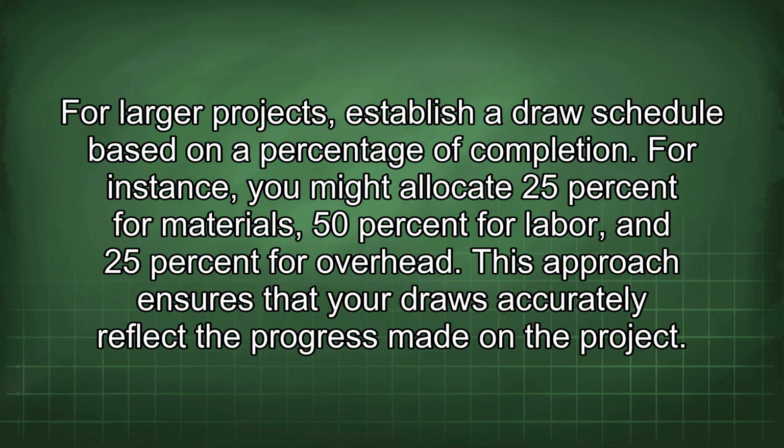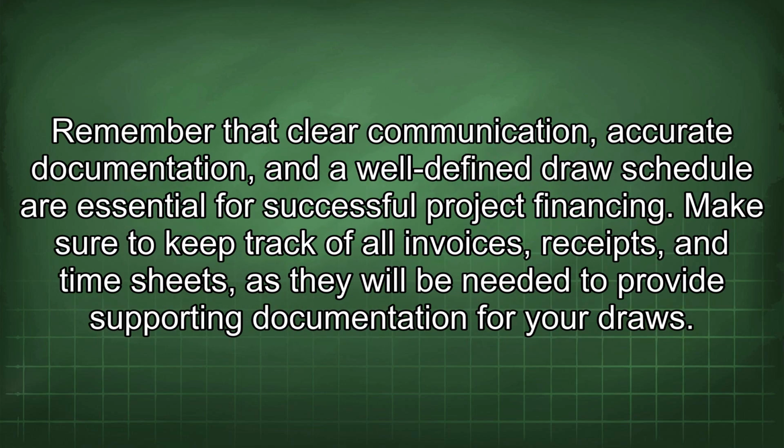For larger projects, establish a draw schedule based on a percentage of completion. For instance, you might allocate 25% for materials, 50% for labor, and 25% for overhead. This approach ensures that your draws accurately reflect the progress made on the project. Remember that clear communication, accurate documentation, and a well-defined draw schedule are essential for successful project financing.